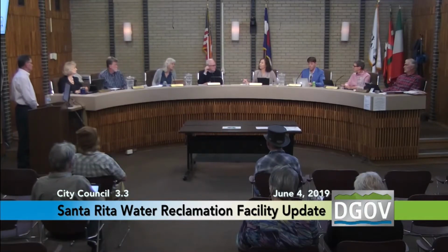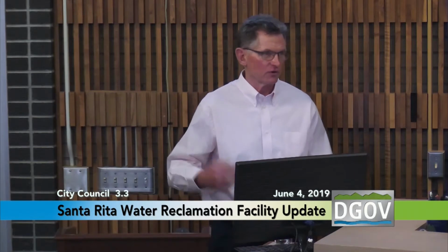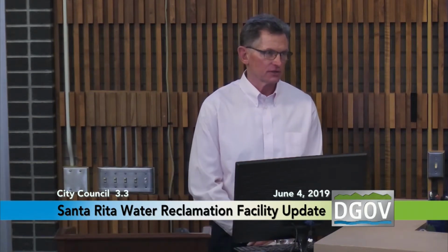What about an update on the administrative offices that were removed? So we bid the admin building and the vac truck building. Those were originally part of the scope of the plant, and we had to remove those in order to get within our budget. Again, those were incidentals. We felt in order to meet the EPA and the state discharge permits, we needed to get the plant in operation. So we pulled those two buildings out of the project.